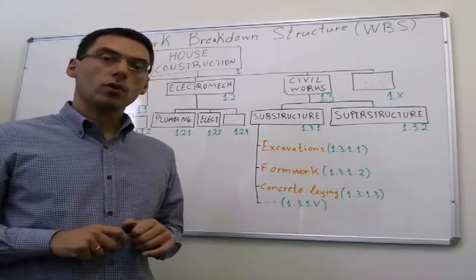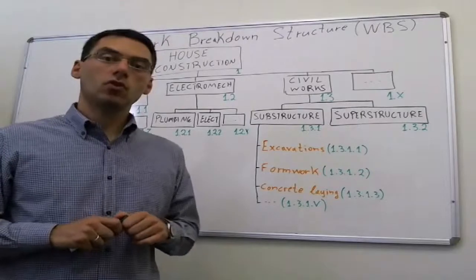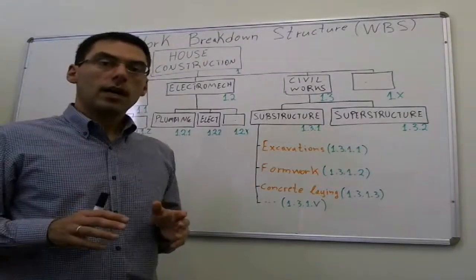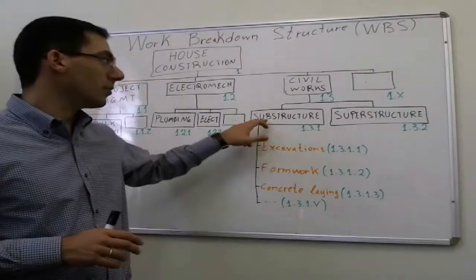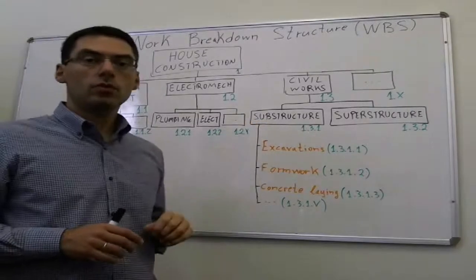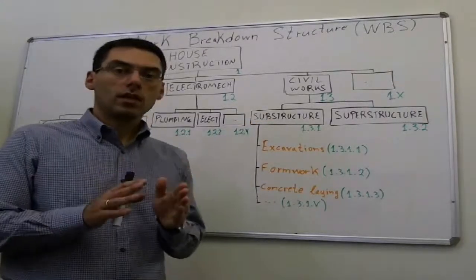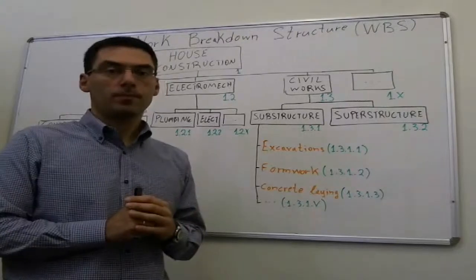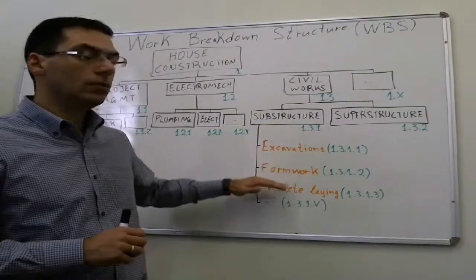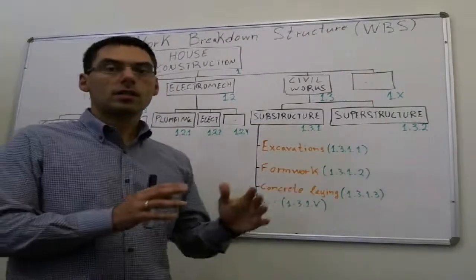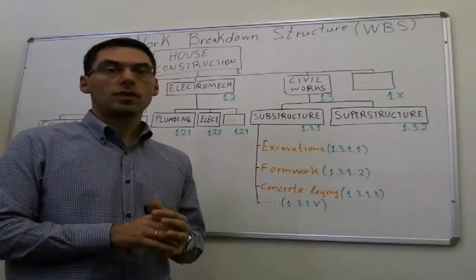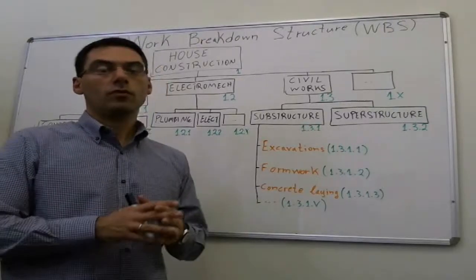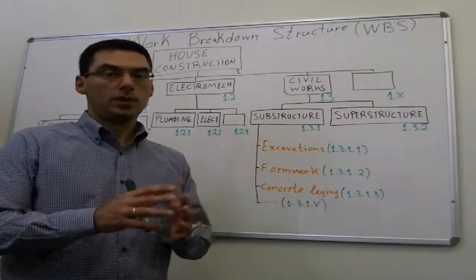You can also use the work breakdown structure in order to define cost accounts. Cost accounts are these very specific items of the work breakdown structure for which you think that you should monitor the cost. Under the cost account, you just assign this responsibility to a specific department of your organization or a specific individual.